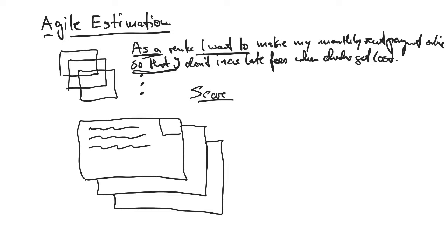But what we do instead is the team during a scoring session takes some number of user stories and scores them by identifying the overall complexity of it. Now, of course, everybody defines complexity differently, but you ask every person on the development team to score the card.